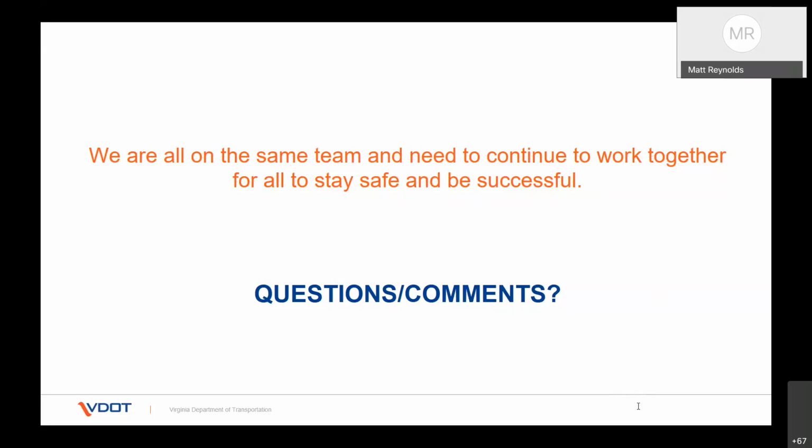And same with plan changes. Be sure if you're proposing a plan change, don't let it stop your project or send it through the whole review process again. Anything that significant should be addressed prior to going to ad.